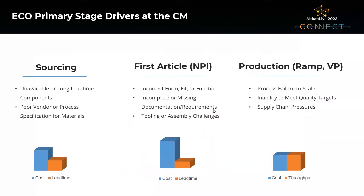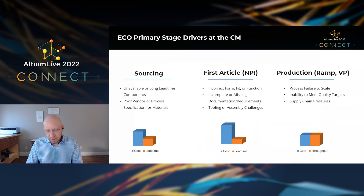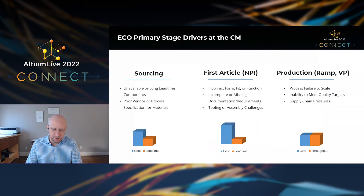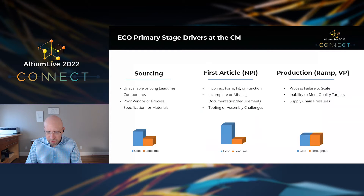We're seeing a lot of that here in 2021 with supply chain issues where components we're designing around can suddenly go out of stock and come in with multi-year lead times, requiring us to find alternative components. The second stage is the first article in new product introduction, where the manufacturer tries to put your process and design to test and verify everything can be built as specified. The big challenges here are around incorrect form, fit, or function of components, incomplete documentation, or significant challenges with tooling or the assembly process.